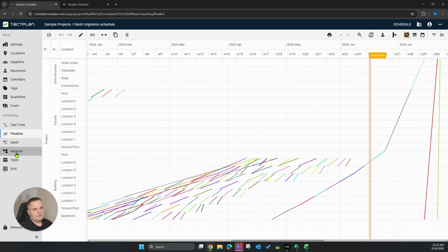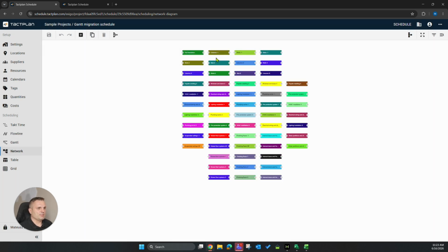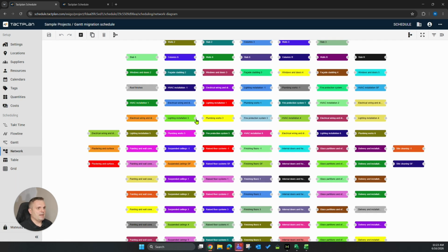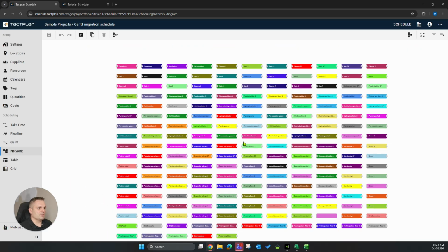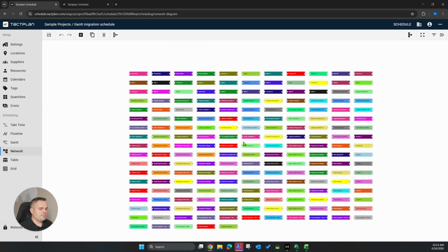Here, unfortunately, it's just a simple one-dimensional migration. The tasks, as you can see, are not connected. They don't have finish-start connections. It's just a snapshot. But it's a good place to start to see how healthy our Gantt chart is, how healthy our plan is in the critical path method.